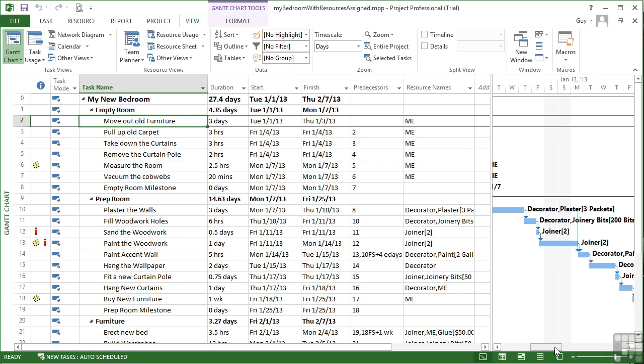In project 2013, if we want to add a fixed cost to a task, we could use one of the cost types such as glue that we've got and assign that to a task and give it a value. But we might want to physically call it a fixed cost. So it's a cost associated with the task that has a fixed value. These kind of fixed costs can also be assigned to the summary tasks because they don't have any bearing on what's happening in effect because they're not driven by how long the task takes, not driven by the materials used within the task, not driven by one of the cost types that you want to put in as we have done for glue.